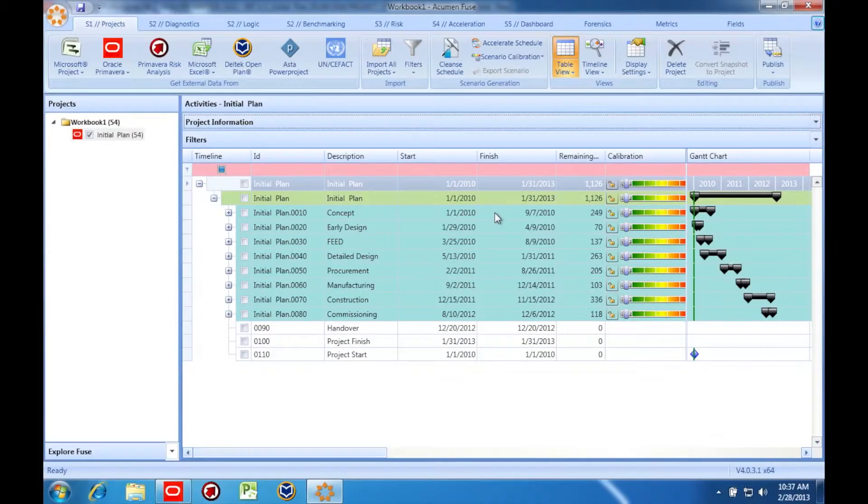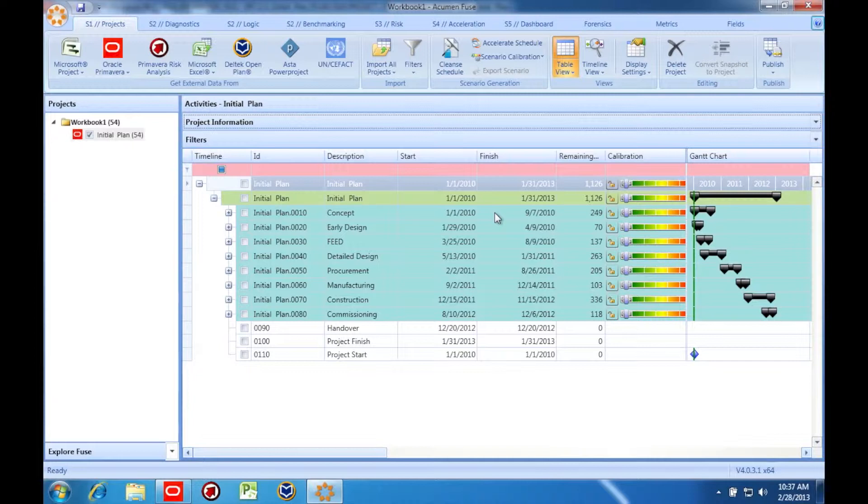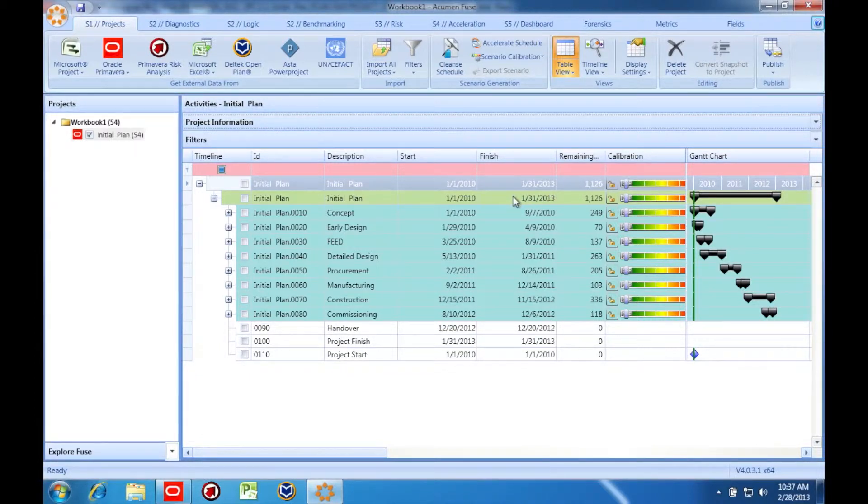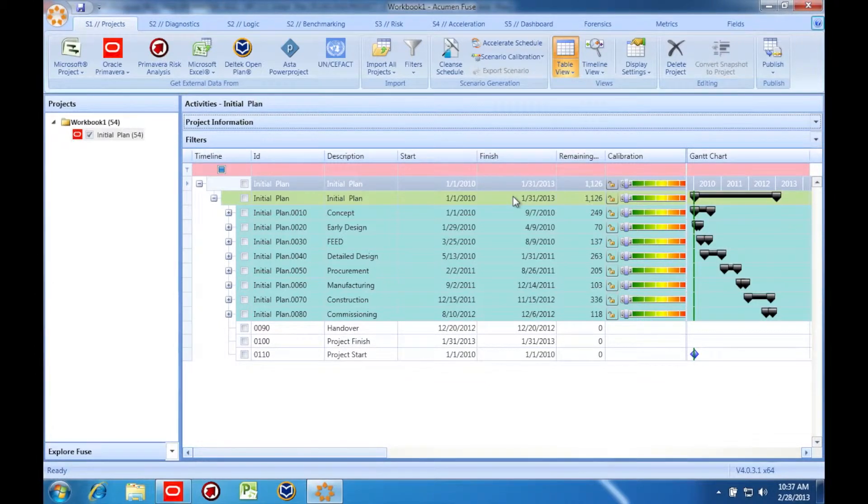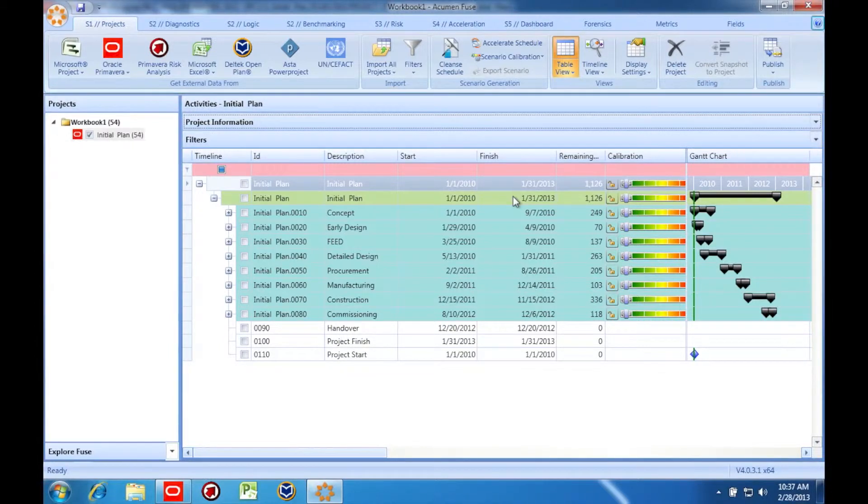One very common scenario is that a schedule's forecast exceeds the contractual completion date. The project team must then look at the plan and determine if the committed completion date is still feasible, or they must request schedule relief from their customer.